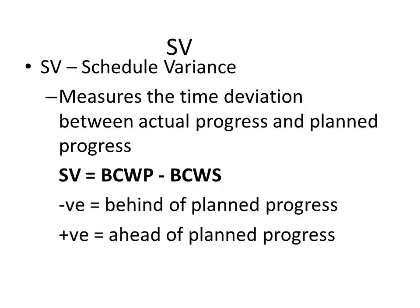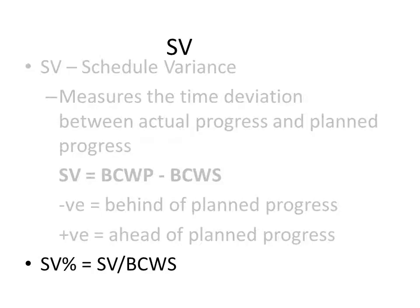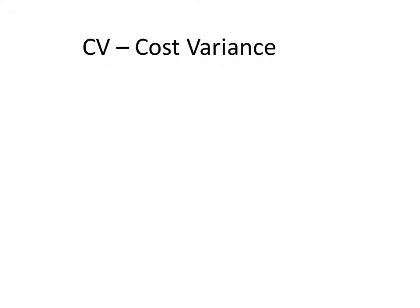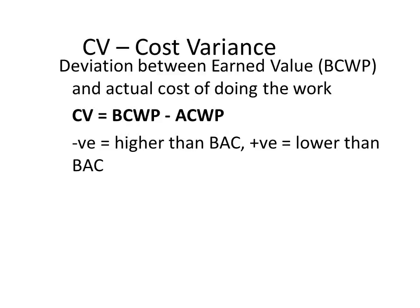Schedule variance is a measure of time deviation between actual progress and planned progress. If the result is a negative figure, it's bad news — your project is falling behind plan. If it's positive, your project is ahead of plan. The formula used to calculate schedule variance percentage is: schedule variance divided by budgeted cost of work schedule.